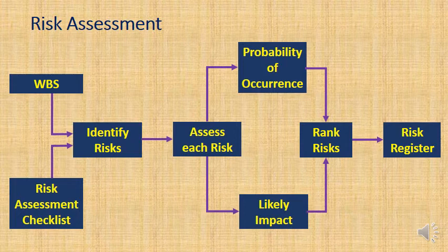Now, this is a very simplified risk management process. Potentially, one risk could have varying levels of impact. So, the impact of the concrete being low quality, well, that could be 20,000 with a probability of 50%, or it could have an impact of 100,000 with a probability of 5%, and so it could vary. And I'm not going to go into those details.